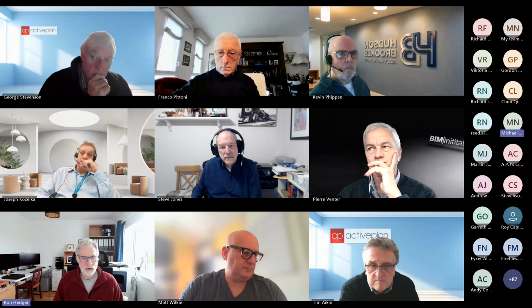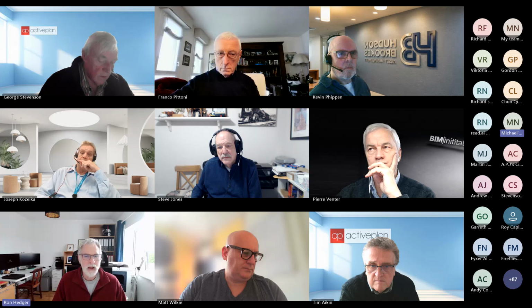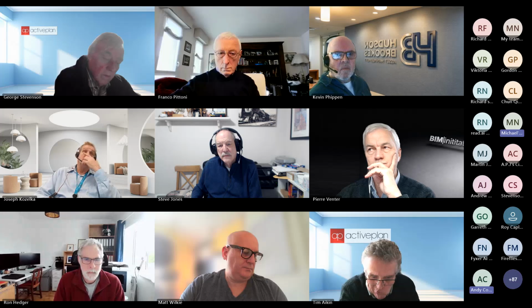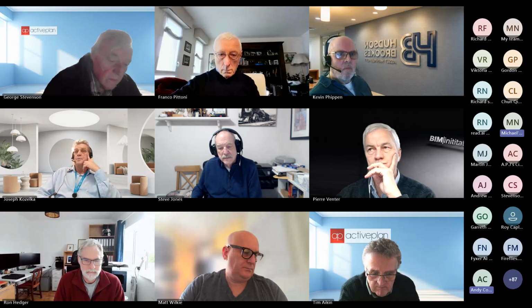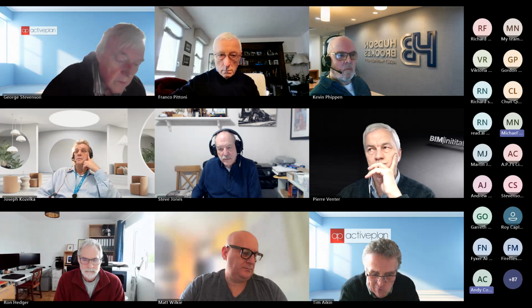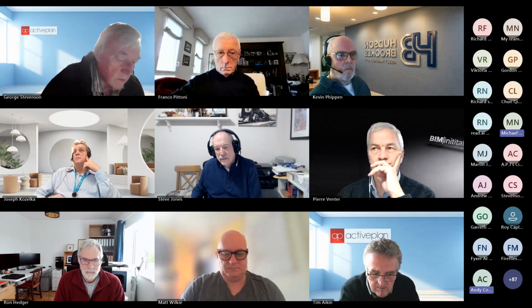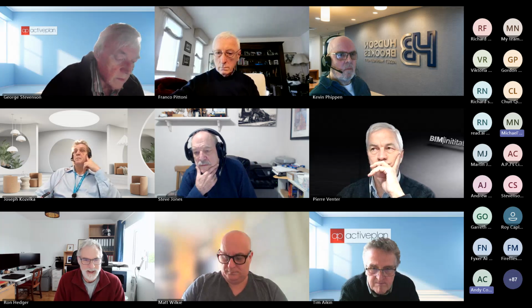That must be demonstrated to have been built exactly to the design that was set at Gateway 2, and Gateway 3 incorporates the handing over of all necessary Regulation 38 information. Yeah, I think one of the things I've raised on previous calls is that, dealing with the Regulation 38 handover, the digital handover, I'm evidencing the fact that most of what I'm receiving isn't an as-built document.